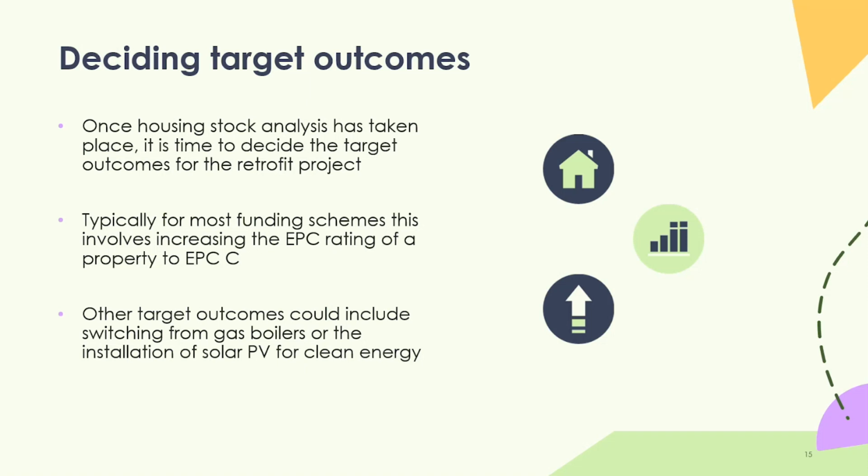So let's map what it's going to take to get them to net zero, and at what point which measures will get them to an EPC Band C, to then allow me a platform to get to a net zero target. You might also want to consider getting it clean heat ready. So what measures do you need to install onto the property to get it clean heat ready for future phases of work that you might look to install.